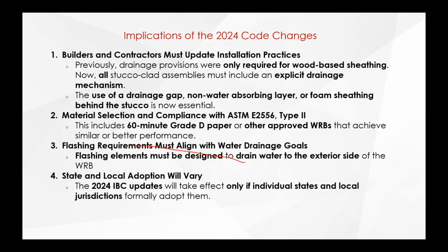But here's a big one right here, so take some relief in this. State and local adoption will vary. You may be working in an area that's already doing this, and you may be working in another area where they're not touching this at all. So just be aware of it. Ask around, because the worst thing that can happen is you assume it's not there, you build it, and then something happens, it leaks, and a consultant comes out and says, whoa, you didn't comply with any of the International Building Code changes. And then you might be stuck that way. I'm not saying everybody is doing this right now, but just do your homework to make sure.